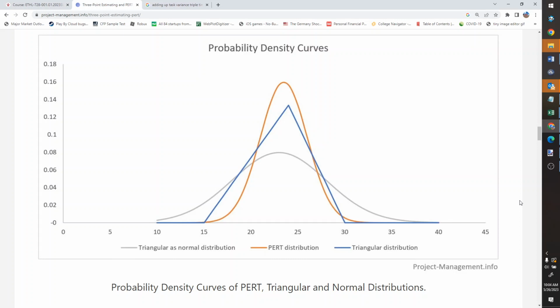that is common practice, is to think about coming up with a distribution around the potential outcomes and describing it with an optimistic time and a pessimistic time. The way this is generally described is to say, okay, out of 100 times, what's going to be the slowest one and what's going to be the fastest one? What's your 99th percentile and your 1st percentile for time? So you'll have one that's pretty long and one that's pretty short, and then you'll have a most likely time. And those don't have to be symmetric.